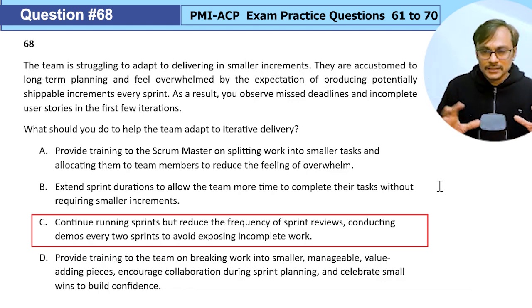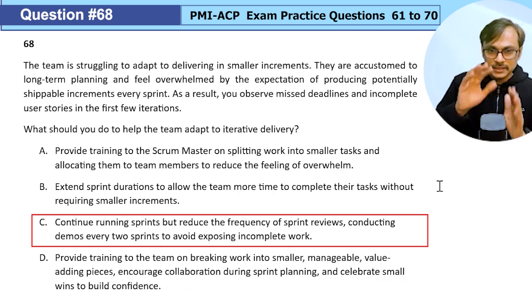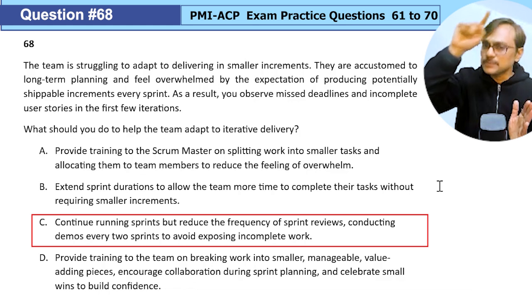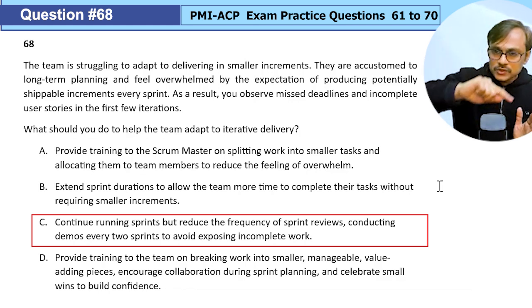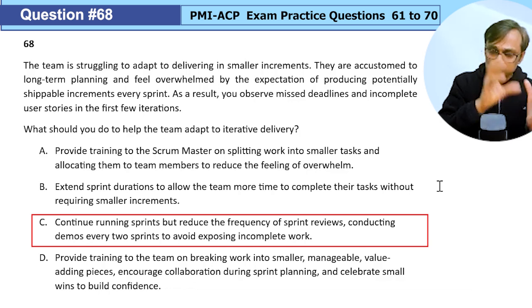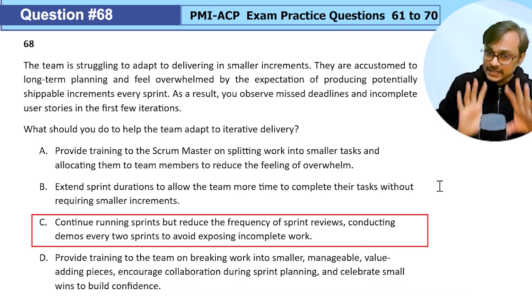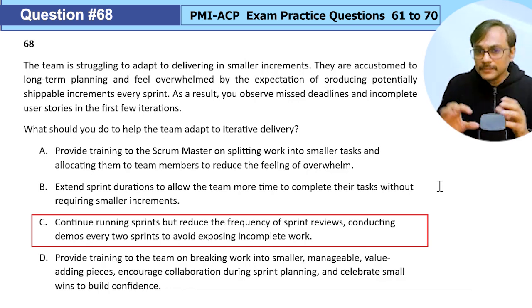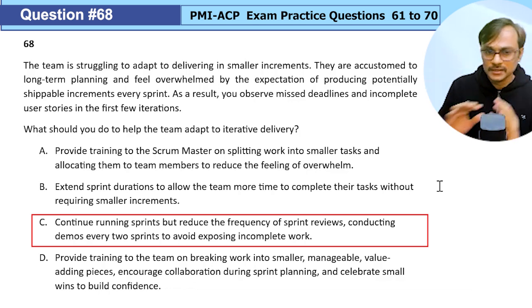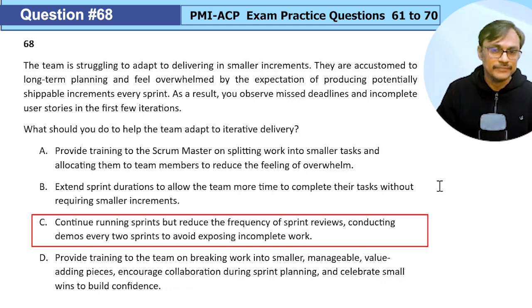And the whole idea of a sprint, the way we need to learn it, is that it's a complete exploration cycle. We need to finish all elements which help us in exploring the work. So it should include plan, do, check, and act. It is not like only doing, and not checking and acting, not taking inspect and adapt feedback. We need to take feedback at the end of the sprint. So not a good idea.